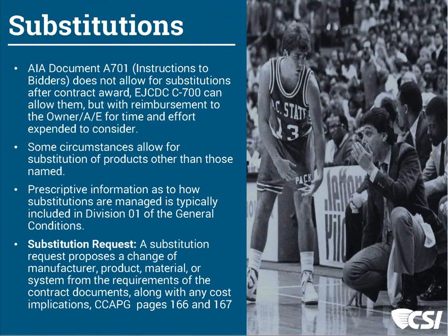Now let's talk about substitutions, which are very different from modifications. Our documents — whether in instructions to bidders like AIA document A701 — talk about what substitutions are and when they can be made. Some are allowed, some are not. The perspective on substitutions, what expectations are, and how they're managed is typically found in Division 1 in the general conditions.